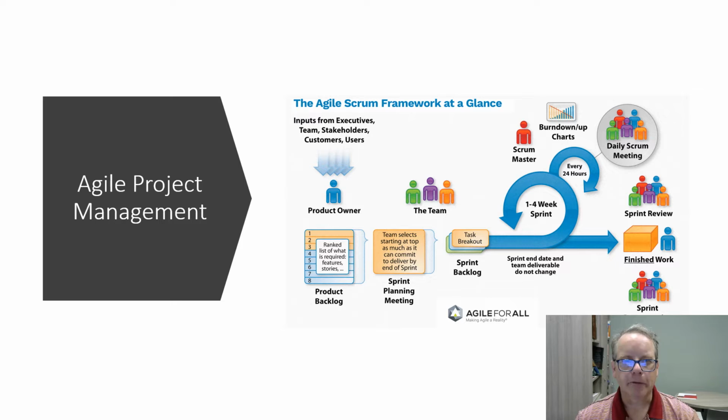Projects begin with an analysis phase, where the best possible representation of the system is discovered. Then the teams take the set of requirements, define and develop solutions in very short, fixed time frames, usually 3 to 6 weeks. It's intended that features are defined to be small enough to be completed in these short time frames in order to keep the project moving forward and getting feedback from end users.